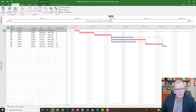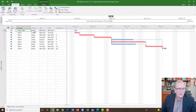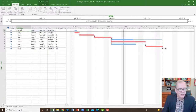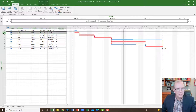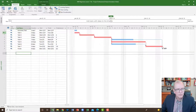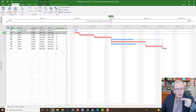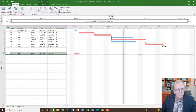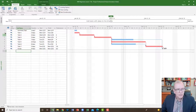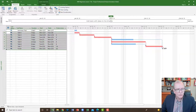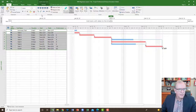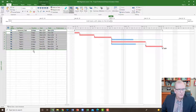I'm going to insert a summary task here. I'll right-click, insert task, and call it 'summary task' — keeping things simple for beginners. The task is created and sitting above the other activities. You highlight everything down the side by left-clicking with your mouse — make sure you see the arrow pointing in the right direction, not the four-point move cursor. Click out, click back, and scroll down to select them all. Then go to the task tab and click the indent icon, and now you've created a summary task.